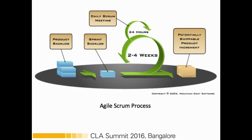Let's discuss the agile scrum process. Basically, if you have a large project, you divide it into smaller parts called the product backlog, and each product backlog is separated into small manageable parts. Each sprint backlog has a maximum time duration of up to two to four weeks, determined by the programmer or developer. Each day there will be a daily scrum meeting to check the progress of the project. When following the agile scrum process, the product or application is always shippable — there will be workable code at all times.